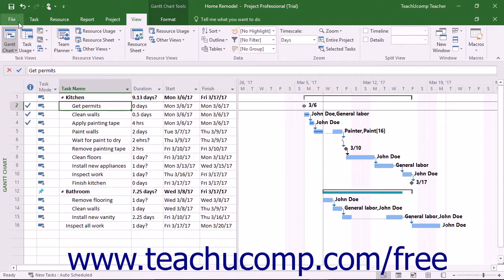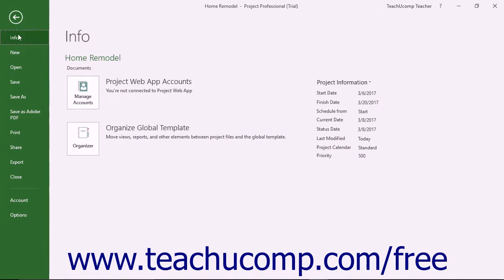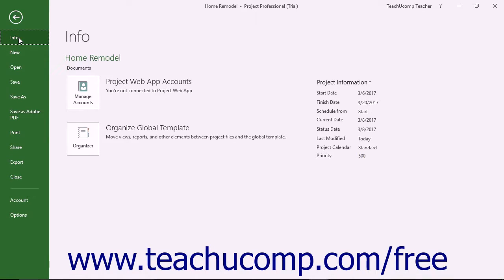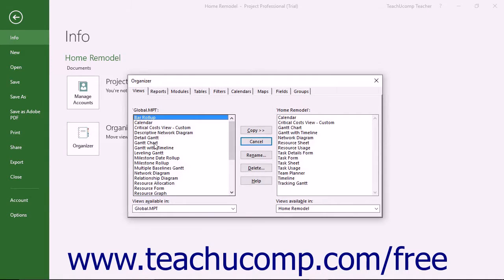Then click the File tab in the ribbon and select the Info command at the left side of the backstage view. In the area to the right, then click the Organize Global Template button to open the Organizer dialog box.